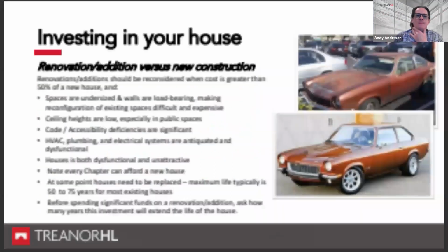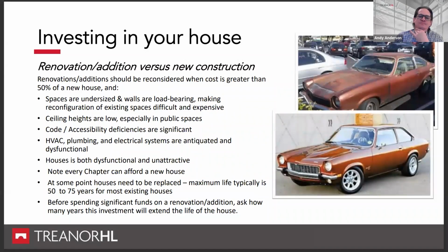All right, next slide. Again, we know everybody can't afford a new house, but at some point you can't kick the can down the road any farther. If the renovations or additions we think we need to make the house competitive and meet your needs cost more than 50% of a new house, then if it's possible, it might be worth investing the additional money to build a new house. And that's for several reasons.